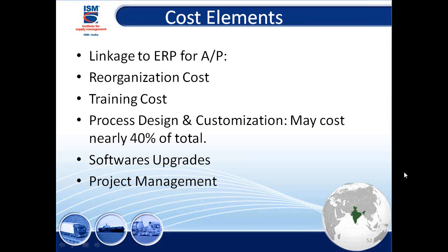And this is a major chunk. Business process has to be re-engineered. And then you have to see, okay, can I use the standard systems around? But this costs enormously, 40% of the cost of the whole project. So don't just go with the license fee. It will be very small. There are other costs which go into it.